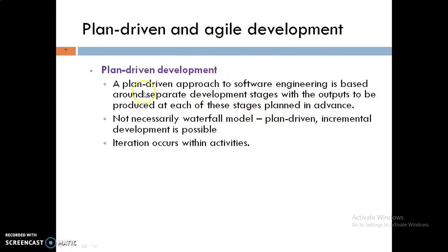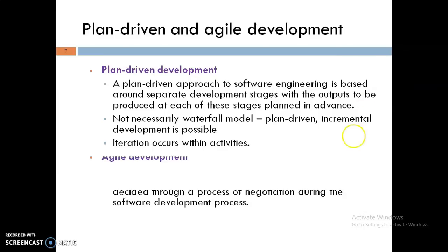In plan-driven development, all the software development activities are planned in advance, and these activities are executed after making a plan in advance. This plan-driven approach is not necessarily like a waterfall model. Incremental development is also possible in plan-driven development. So iteration within the activities is possible in the plan-driven approach.